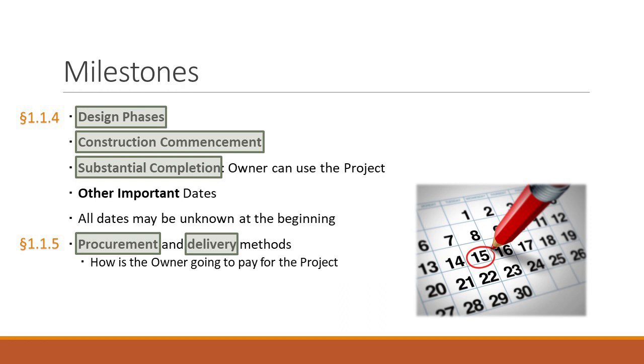Sometimes you have, for example, let's say you're designing an apartment complex, and it's a 30-story building. Well, the owner will want to start renting out units as soon as possible. Instead of waiting for all 250 units on the 30 stories to be completed, they want the contractor to finish them in phases.